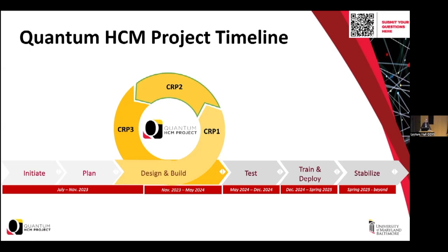Like the word says, conference room piloting works like this: with our partner Huron, who brings a lot of experience from the higher ed industry of implementing these systems, their leads configure the system to a basic level with UMB values, and we have some converted data. We gather with the project core team in a conference room setting, and test scenarios based on the requirements we've gathered from our discovery and pre-implementation phases are run through the system.